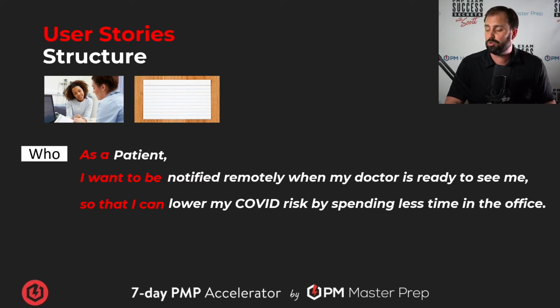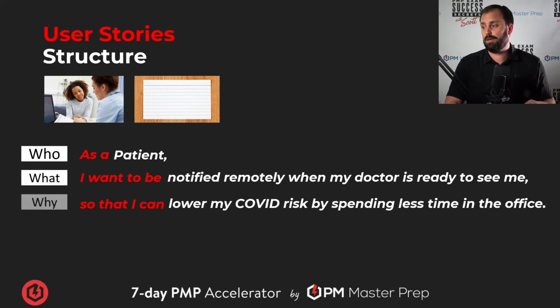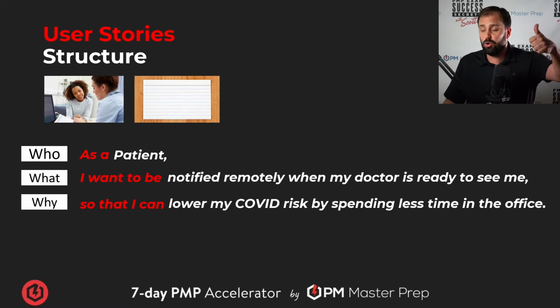All right, it makes total sense. And if you think about it, "as a patient" is who. "I want to be," all the details, is what. And then why: "so that I can." So you hit the big ones. Who, what, why. To get understanding, that's what you need, right? A user story is super powerful. Who knew that a piece of paper would be super powerful?